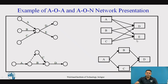The next slide shows another network diagram with various activities and their interrelationships. Activities A, B, C, D, and E are represented by rectangular nodes in the AON network diagram, and here there is a crossing of arrows. Similarly, in the second example, there is a dummy activity present in the AOA diagram which is eliminated in the Precedence Network Diagram — AON. This is the advantage of the precedence network diagram.